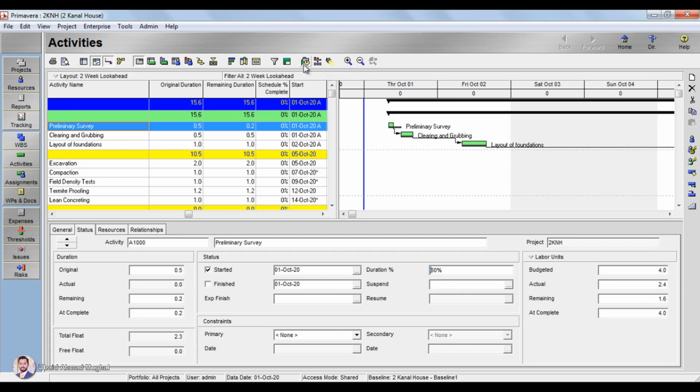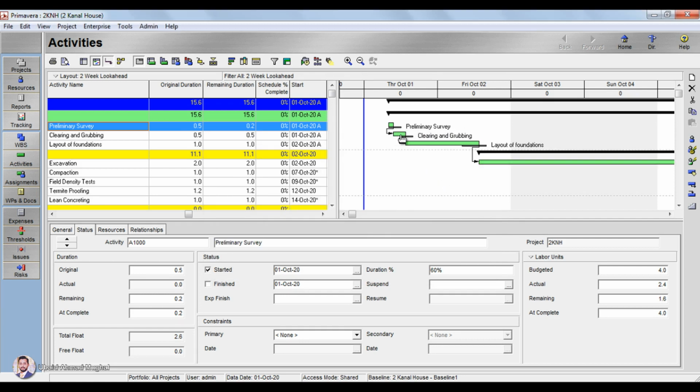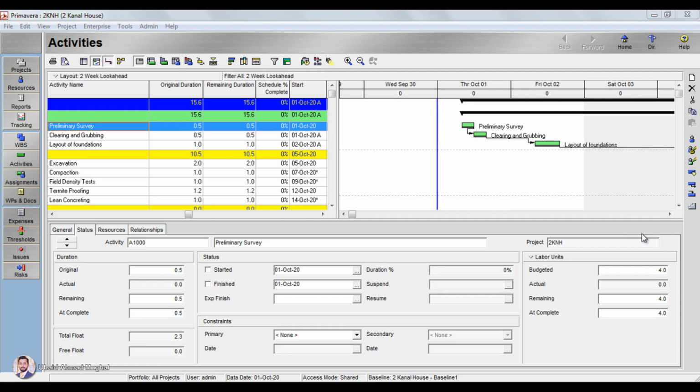That we can see by clicking on this schedule button. Let's say I click here on schedule, and you can see all the activities have been shifted backwards, which is an indication that your project is going to complete before time. So in this way you can add the progress of every activity. आप हर activity की जितनी भी percentage complete हो चुकी है वो आप डाल सकते हैं. I personally use this percentage option.